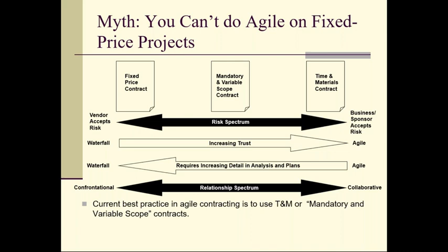So instead of committing to 60 points per iteration times 5 iterations, I'm going to spread those points out across the 6 iterations. I'm going to spread the work out to kind of hide that there was an empty iteration. So instead of 60 points times 5 iterations, I'm going to do 50 points times 6 iterations. Still adds to 300 points in 6 months, but it allows me to have extra built-in buffer capacity hidden inside each one of those iterations.